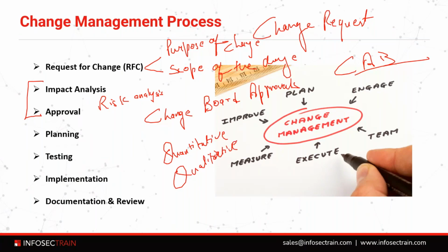Quantitative risk analysis calculates discrete values for the impact and likelihood of each factor affecting the change proposal. Qualitative risk analysis seeks to identify and evaluate impact and likelihood factors through previous experience and informed opinion to replace or supplement metrics. So the outcome of risk analysis is the assignment of some risk level to the change request.